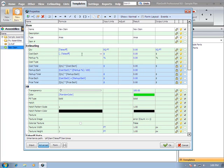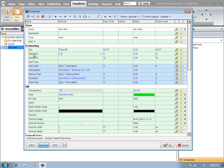If you're looking up the same level or up to the next level, and you want to pull something in, you can also use bracket dot close bracket. That's going to look up the tree until it finds this property name here - in this case, cost each - and inherit that value down.